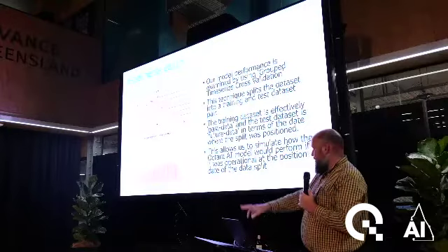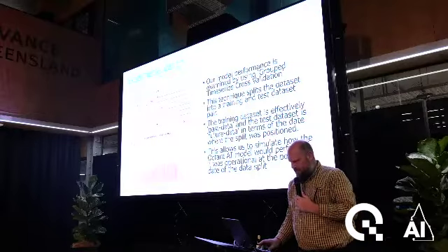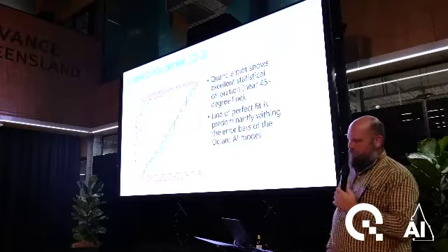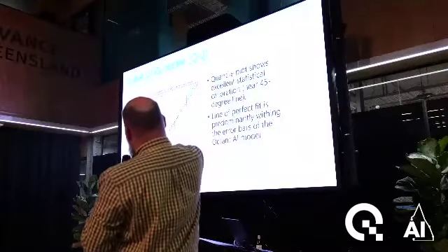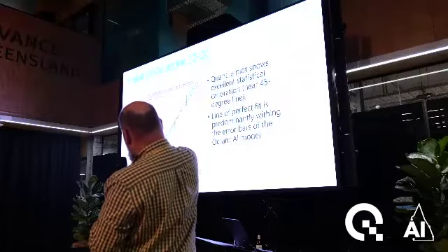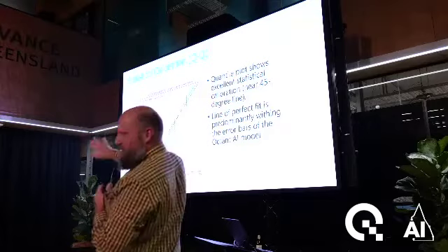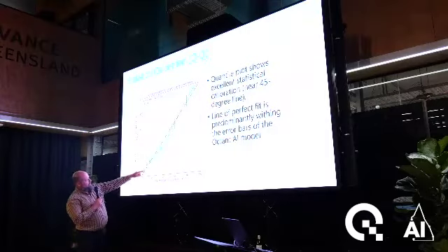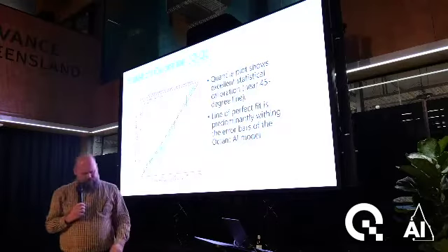Those two things are just, the top one's an artistic interpretation and the bottom one is an actual graph. Another thing is, when we have our distributions, we don't want to guess and say, oh, it's a beta distribution because everyone uses it, or use a triangle or some other strange shape. So what we try to do is these QQ plots. We have the distribution of the actual percentage, and on the other axis what we're predicting, with the P5, P10 going along, and you want it to be a nice 45-degree line. When we do our cross-validation, this is our mean, and this is the range that we're getting out of all the different randomly sampled tests that we did.